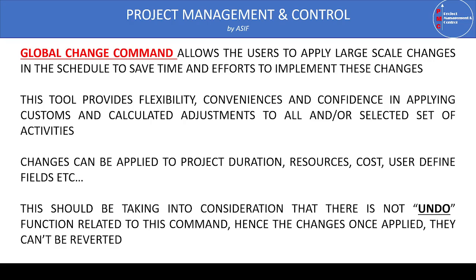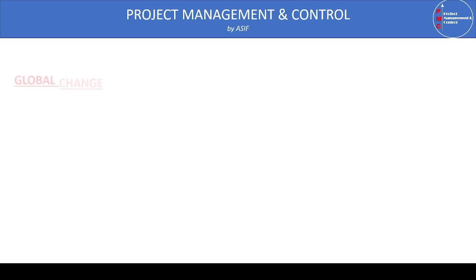It is quite possible that when writing the condition in the Global Change dialog, there are typo errors, or sometimes we are not writing the conditions or formulas exactly correctly, and it will come up with wrong results. Once you apply or commit the changes, you cannot revert back to the original program. So please, please, please — before making the Global Change, make sure you have a copy of the original program.